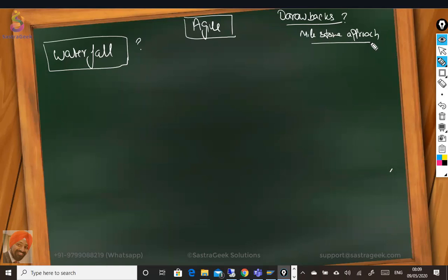After each milestone completion, we go to the next milestone. And finally, we go live after cutover. The drawback is that the project has to be completed fully to go to production. If it is a year, we have to wait one complete year to realize the implementation benefit. There is no prototype methodology to see it in production.